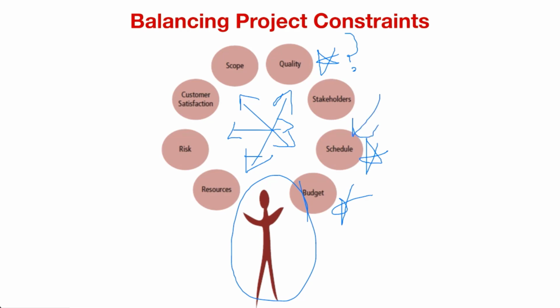Now, that then has impact on the project schedule. And how do you manage that as an advertising agency? How do you manage that as a project manager? You then have to tell the client, listen, this project will take longer. But the client says, no, I'm launching the product at a certain time. Now I can see these two are now in conflict. Not only that, you also have a budget that now suddenly is out of the water.